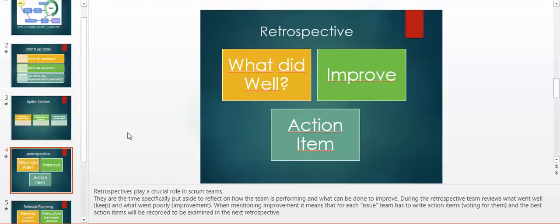When we mention improvement, it means that for each issue, the team has to write action items, vote for them, and the best action items will be recorded to be examined in the next retrospective.